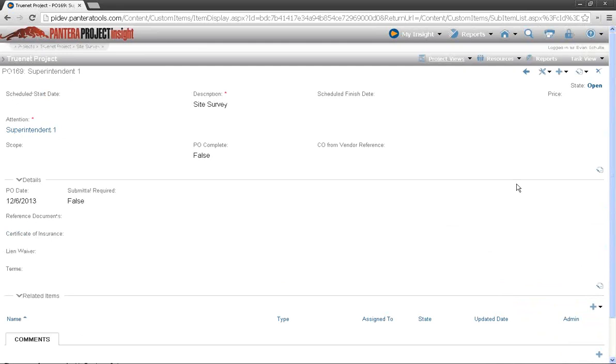Okay, so is that kind of what you're looking for in a purchase order system? What exactly are you mainly using purchase orders for? Well, this would allow us to do a purchase order per function, per project, which would allow us to have committed costs per line item, which we do not currently have. Okay. So it would be a nice function.